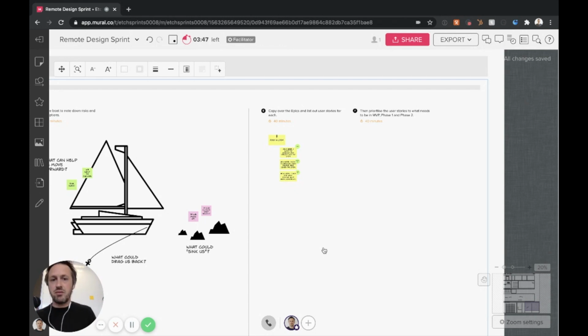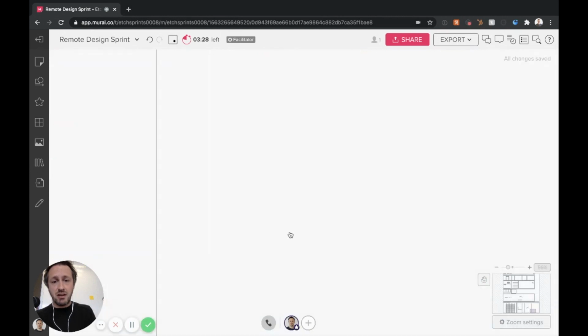And towards the release of it, do a retrospective and find out, okay, how long was production out of the sprint? If you find 4 months, start doing a map of those 4 months, and you can start identifying opportunities to tighten those 4 months. Maybe there was too much to and fro from the designer to the developer who needed certain areas.